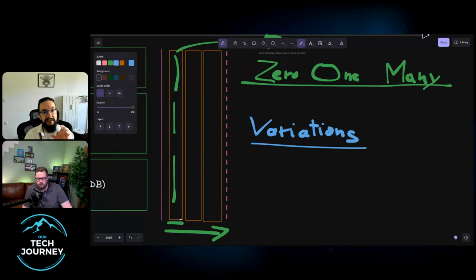What you're negotiating on is you and the team and the managers and the business people can negotiate on how and in what size of increment it goes out, rather than just the first iteration being there's three choices and the choices are on screen and all of them work equally well, right? Because then you basically have no progress, no progress, no progress, no progress, and then you get a lot of stuff at once.